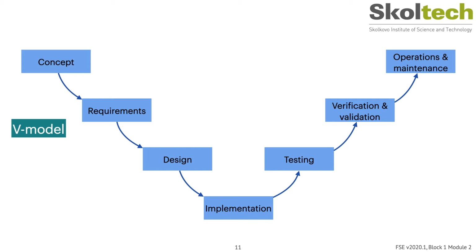So what you can do is bend this waterfall model into a V shape, as shown here. And so the tasks on the left side of the V, they kind of break the application down from its highest conceptual level into more and more detailed tasks as you keep developing the architecture and the high level and low level design down to the implementation. So this process of breaking the application down into pieces that you can further refine and implement is called decomposition.